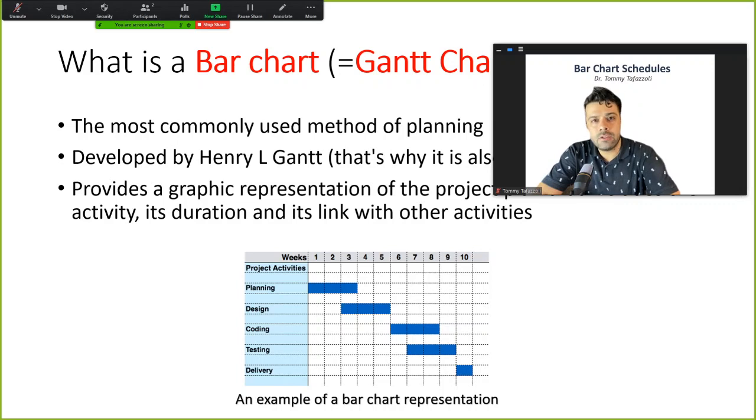And you can actually solve this problem by looking at your schedule, and you see, for example, 5 activities have been scheduled on day 54 of the project, and they are almost close to one another, and a few of them need big equipment pieces or machines. So you just decide to change your schedule and move some of the activities to provide space. Remember, an overcrowded job site is almost always a bad idea. A scheduler should do their best to reduce the overcrowdedness.